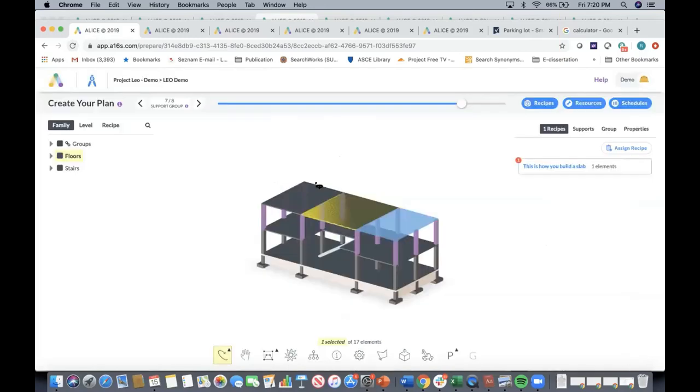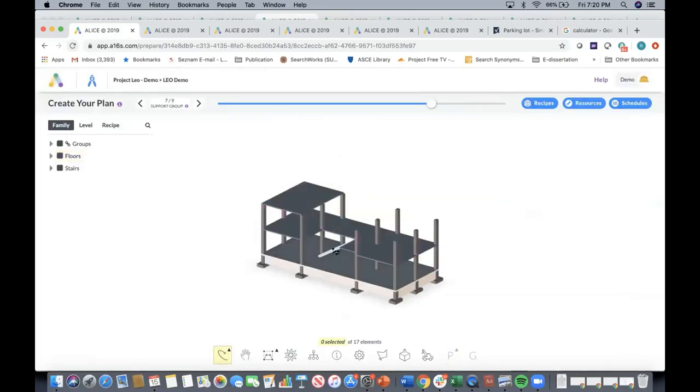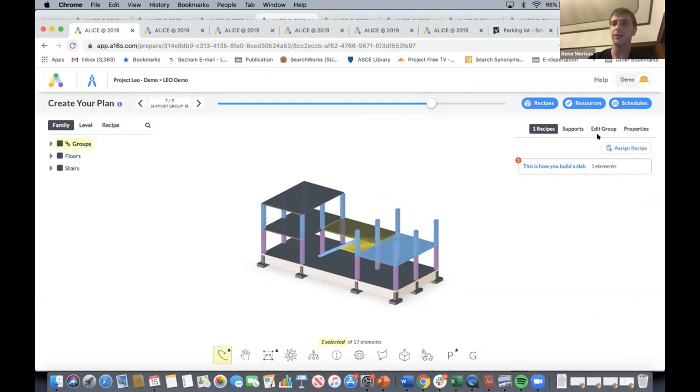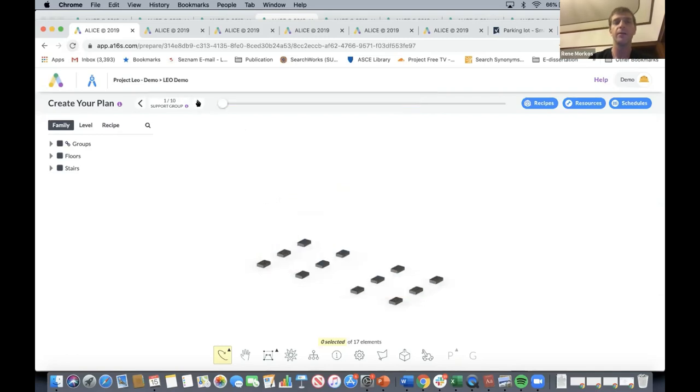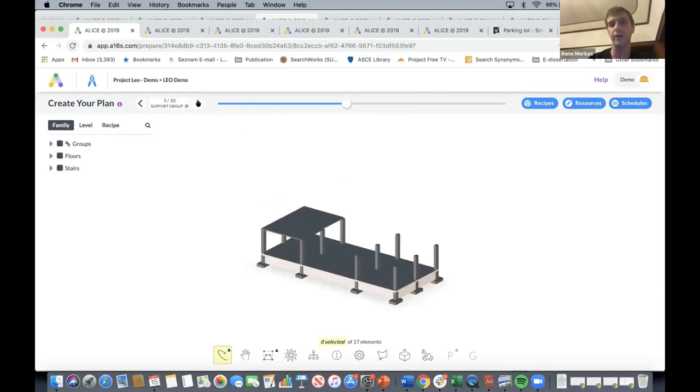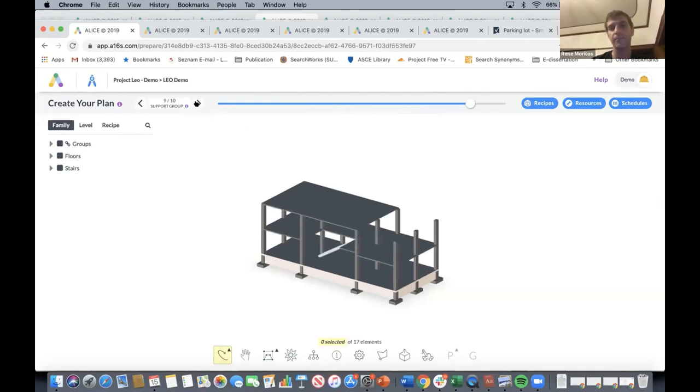So when it's factoring in the cost, do you have to put the parameters in as far as if they're working overtime or not overtime and different? Yeah, so what it does is it factors in if there's idle times, and it definitely factors in overtime. And so, yeah, it factors in if the crews are waiting around. What I just did is I forced those slabs to go one at a time in this order. You see that?